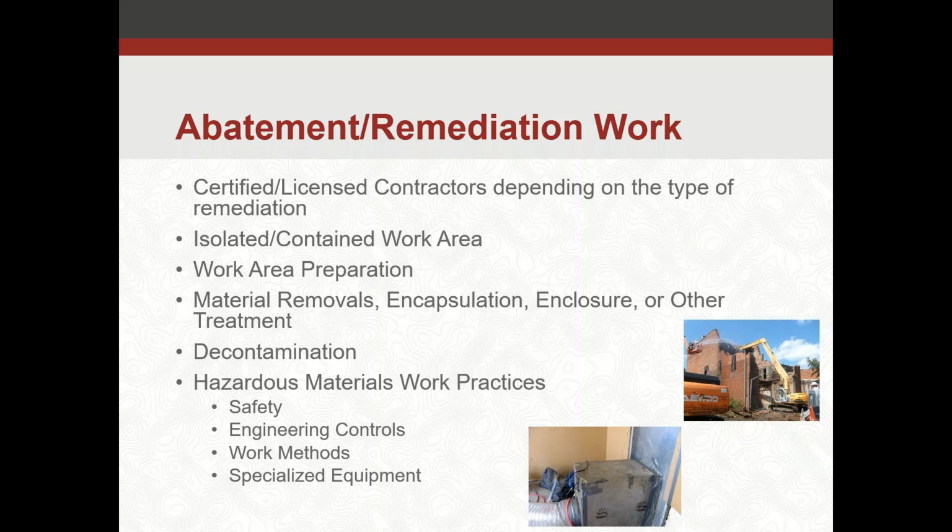For the isolated, contained work area, you want the work area preparations to be part of the remediation work. Then the contractor will go through how they're going to address the material. They're going to move it, encapsulate it, maybe enclose it or use some other type of treatment. That's what will be specified in the design and in the work plan.